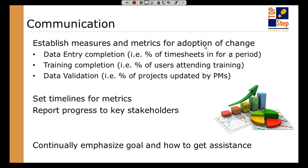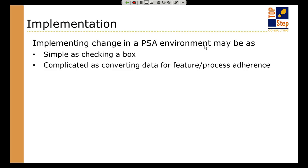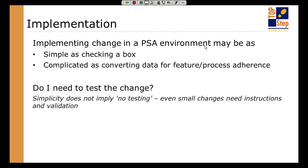Now, implementation — this is more specific to rolling out a brand new process or system. In a technology tool like a PSA, making a change could literally be as simple as checking a box and hitting save if you have the permission to do so. But sometimes a tiny checkbox can have a big ripple effect — suddenly something is required that people didn't know about, or they try to save a form and can't complete it because something else is being triggered that they don't have access to. So even a simple checkbox really requires a bit of testing.